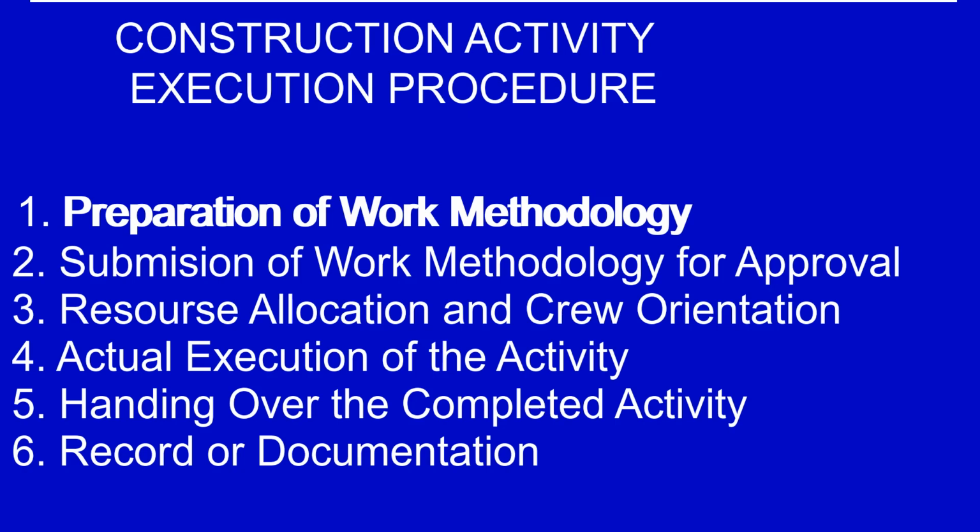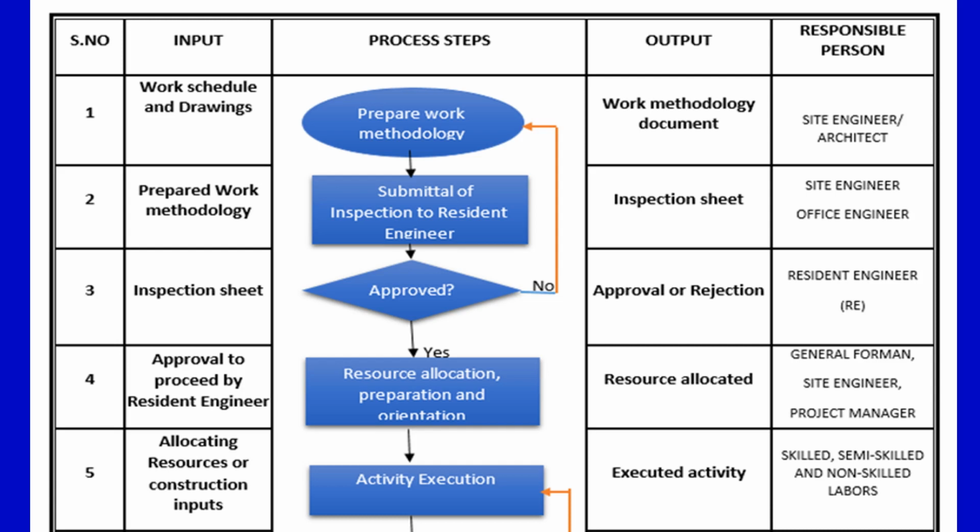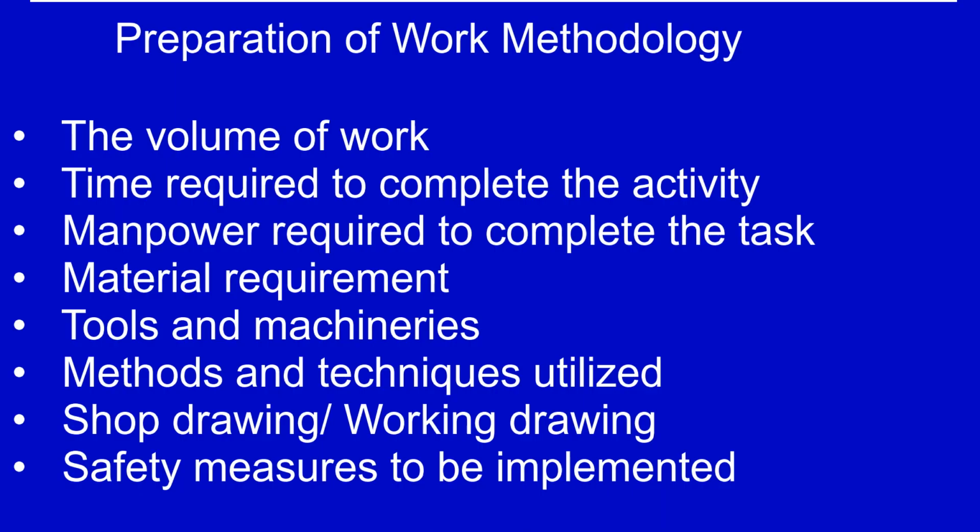Step 1. Preparation of work methodology. Using the master schedule and approved drawing as an input, the assigned site engineer will prepare work methodology in consultation with the office engineering team. Your work methodology will cover the following points. The volume of work. The volume of work is sometimes known as the scope of work of an activity or total quantity. Time required to complete the activity.